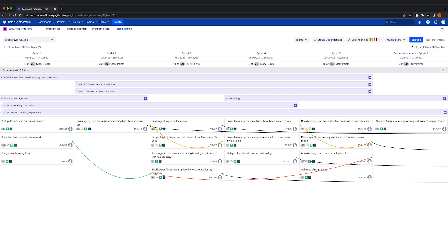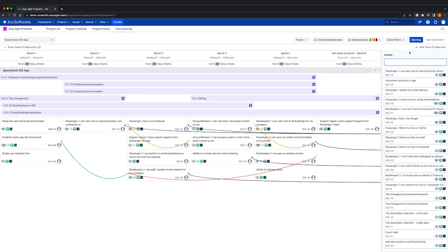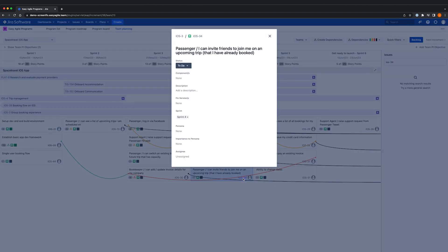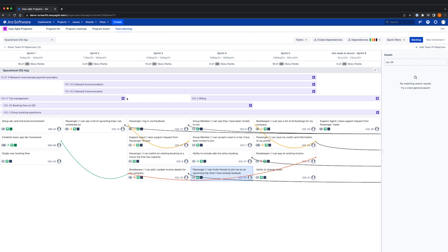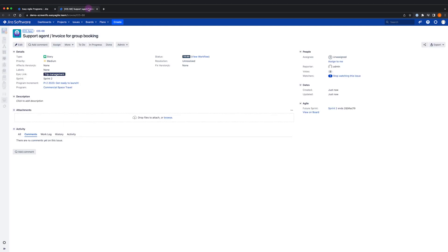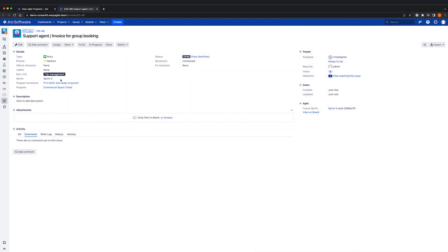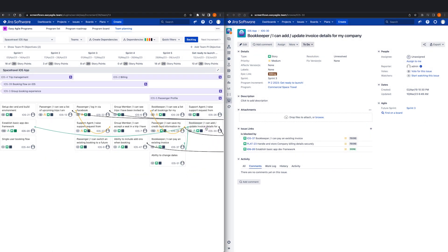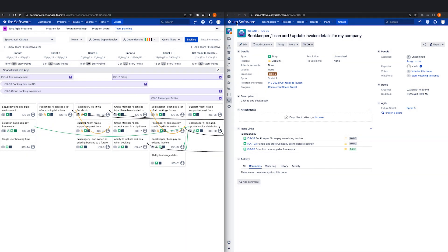Easy Agile Programs allows you to schedule an existing issue or to create a new one and link it to an existing feature. To schedule an existing issue, click Backlog and drag and drop the issue directly into the sprint you wish. Scheduling the issue into the sprint column this way will update the sprint field on the JIRA issue view. We can also quick create an issue from the team planning board. To link the new issue to an epic, we need to first click the epic, then create the issue. Creating an issue in this way populates both the sprint and epic field. From the team planning board, we can easily reschedule an issue through drag and drop, and these custom fields will also update with the new information.